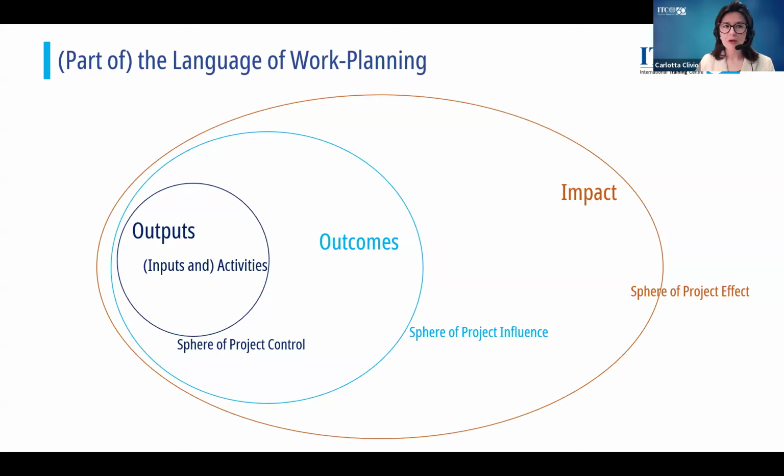Again, think about yourself and your team, if one is involved, actually implementing the project. And consider if anything may happen along the way that, again, you need to inform UNDP Rome about, and the evaluators and the ones judging the quality of your project design. Here, I would say this. Let's imagine that you want to service a specific community that, however, you have very difficult access to. That already tells you something about risks involved in implementing your project. The risk is you not being able to actually service the people that you say need the intervention that you've designed. So how do you plan to account for that risk?